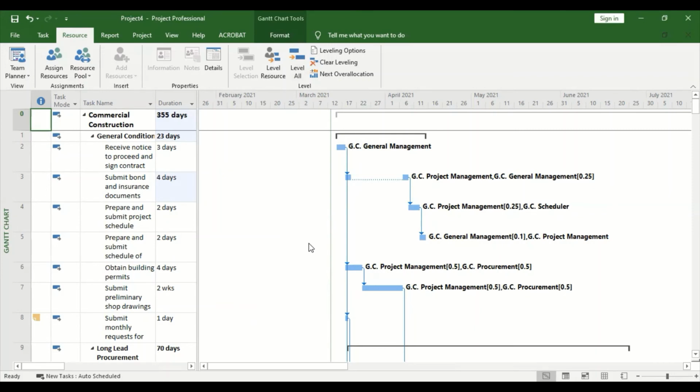But you may say, why would I need to do this yet it is increasing the project duration? You want to know, in case I don't over-constrain my resources, how long can I take to finish this activity or this project? It's like you want to analyze and see, if I work normally without overtime and everything, how long am I going to take to finish that project? So if you see that the difference is not big, you can work with resources without exhausting them.